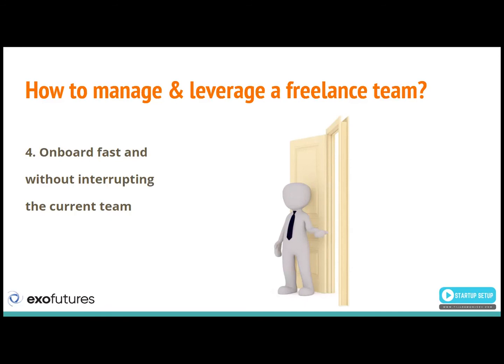So from the very beginning, whichever tool and workflow you decide to use, I use Scrum and Agile, maybe you're going to use Kanban or something else, whichever tool you decide to use, whether it's Monday.com, Jira, Basecamp, Asana, Trello, but start using it from the very beginning and start putting the information in the context, not in the long chats, threads, in emails. The information gets buried there. All the information should be in those tickets, cards, issues, however they are called in different tools. The information should be there from the very beginning, even when you are 2 people on the project and everything is super simple. It needs to be there, because otherwise the new team members simply won't be able to join efficiently and without interrupting the current team.